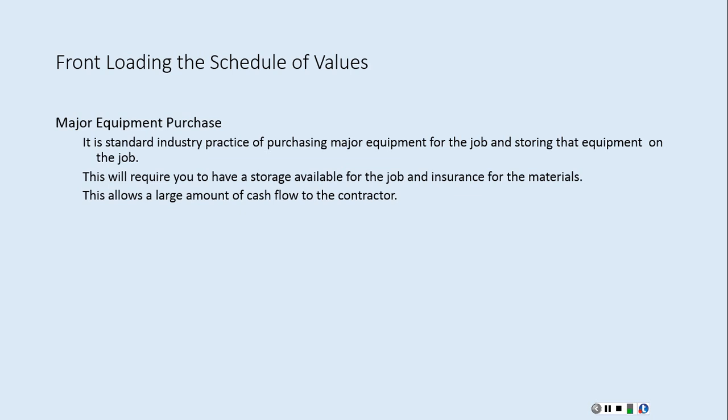When I started my company, the day that we started, we signed a contract for just over $300,000 worth of work with one project. Credit is a big deal with a company. So I talked the owner of the project into trusting us to pre-purchase all the equipment. As far as a mobilization fee, one of the things I put in there was a fee for all of the equipment on the project, because it helped our company out. I got to keep the profit on the equipment and use that to get our company moving and to use those monies wisely.